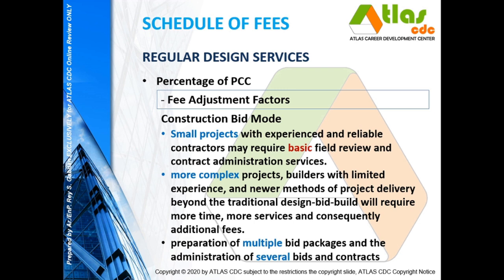On the other hand, more complex projects and builders with limited experience and newer methods of project delivery beyond the traditional design build will require more time, more services, and consequently additional fees. Also, the preparation of multiple bid packages and the administration of several bids and contracts may be costly.